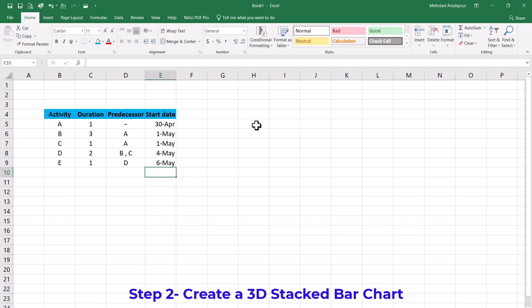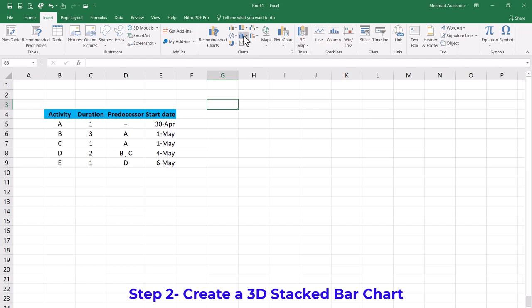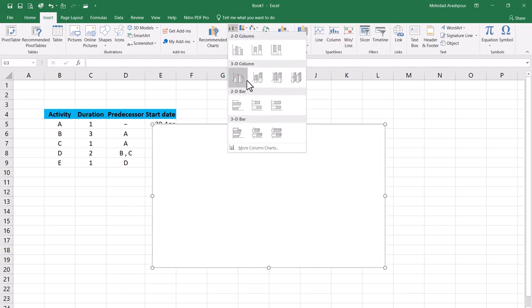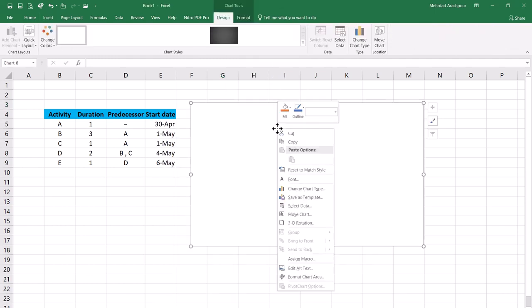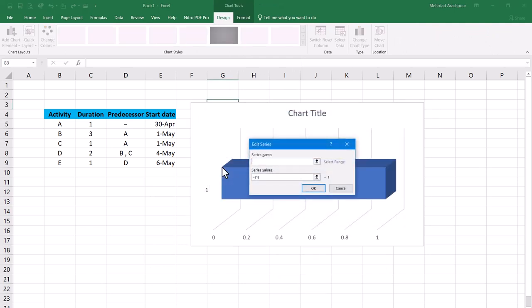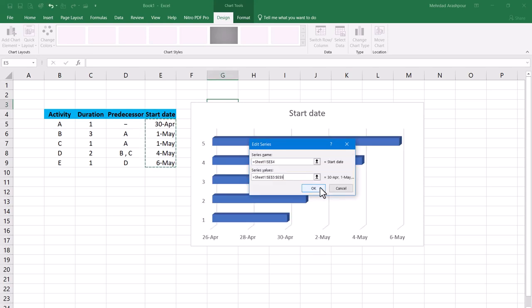Step two is to create a 3D stacked bar chart in Excel. We should click on an empty cell and from the Insert menu and Chart section choose 3D stacked bar. Now right click on the blank chart and from the menu choose Select Data. Then we can add our first series. For its name, Start Date is selected and for the values the 5 dates are chosen.